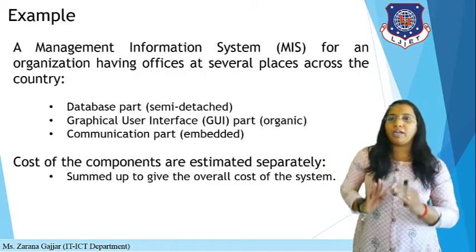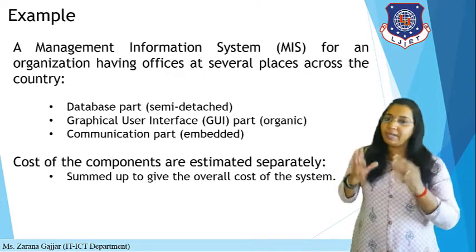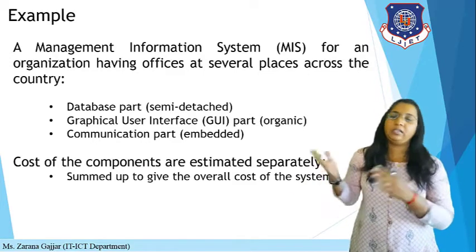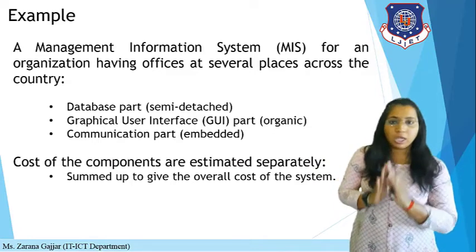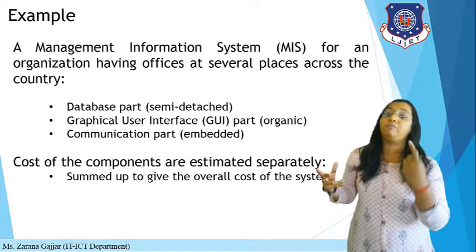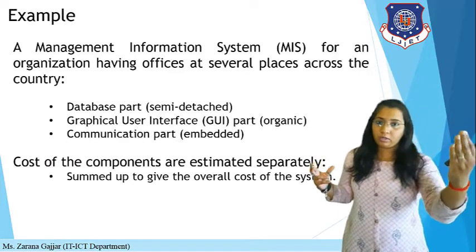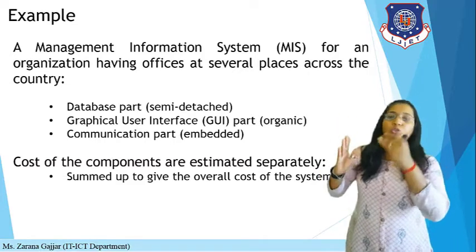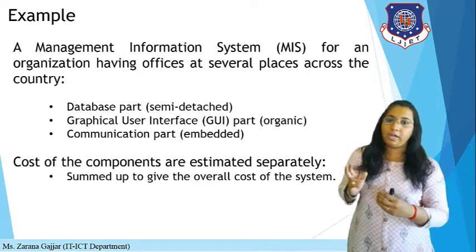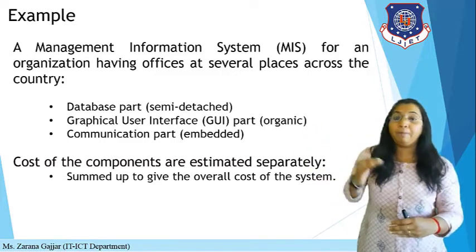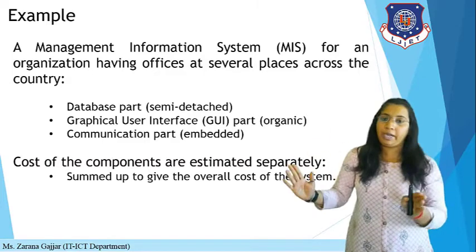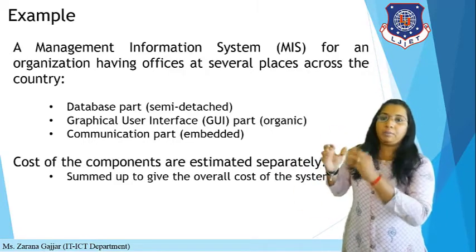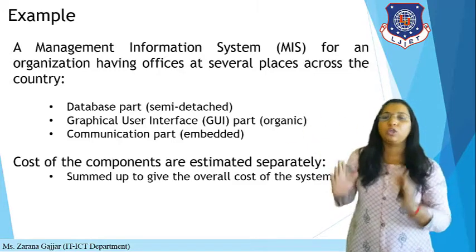The database part is medium-scale, so semi-detached type is used. The GUI is basic — a designer with proper skills can handle it — so organic type is used. Communication is very complex with many branches having different parameters, so embedded type is used. The cost of each component is estimated separately using the 15 parameters, and then at the end, the database, GUI, and communication costs are summed up to get the actual total cost of the system.